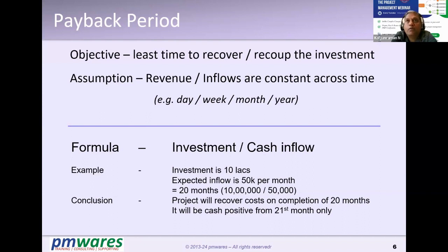How soon am I able to generate that invoice and get that money? Now that money I can recycle back into the project. So this is all about cash flow management for you. If you don't get that money at that milestone, you have to invest or spend a lot more till you reach the next milestone and generate further money. So this example will help you understand those models, how quickly you can get it back.